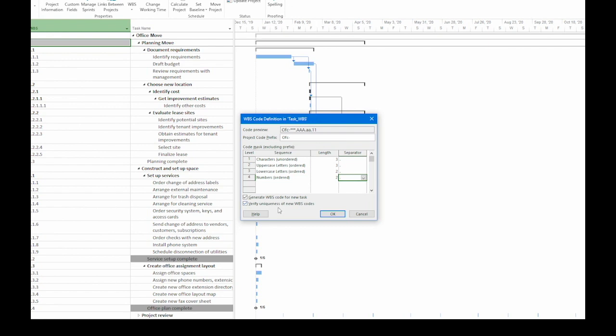The second one makes sure that your new WBS codes are unique. And you want them unique so you can refer to your tasks with these codes.